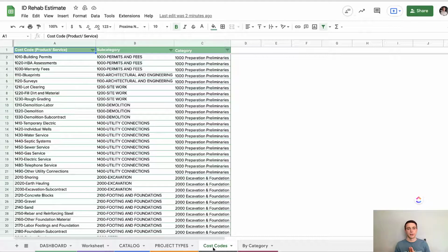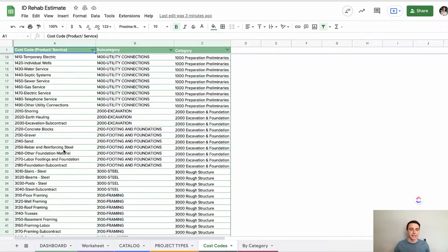Now, your cost codes are completely up to you. I encourage you to come up with your own cost codes. That being said, there's many places that you can look to start. I have a few of them out there. So if you're in my real estate accounting bootcamp course, you have a couple lists of products and services that I give you access to, right? The simple and the complex one. Now, products and services in QuickBooks Online will relate directly to your cost codes here. So link them, make sure they're the same. So if you're already using QuickBooks Online, download that list of products and services and use that as your cost codes here. All right. Now, I started with a list from the National Association of Home Builders, and then I edited it to be my own.